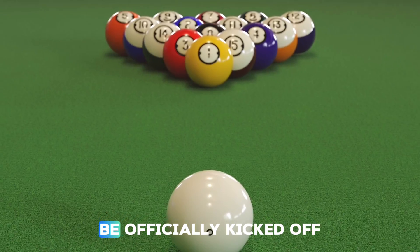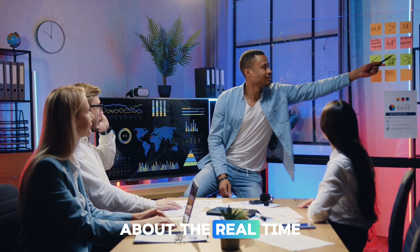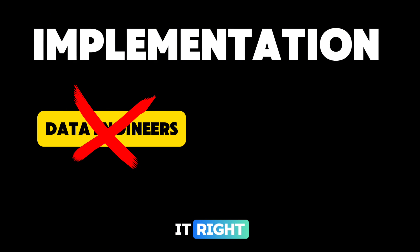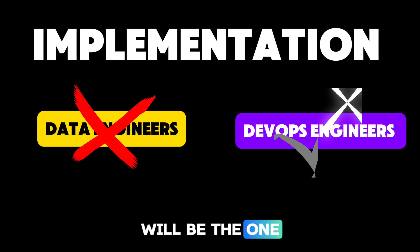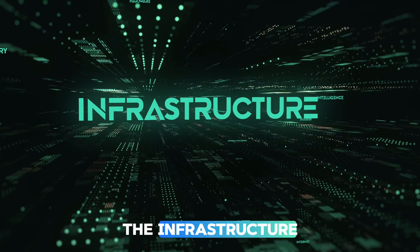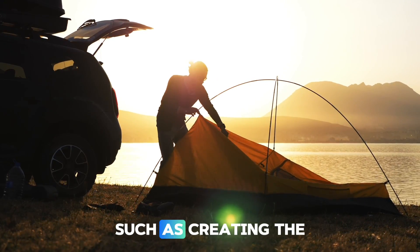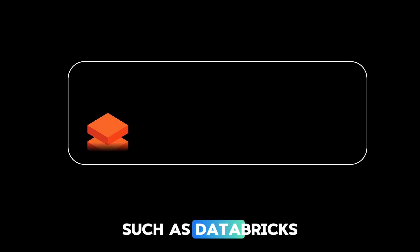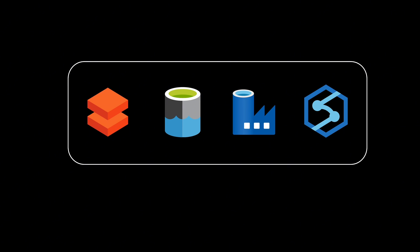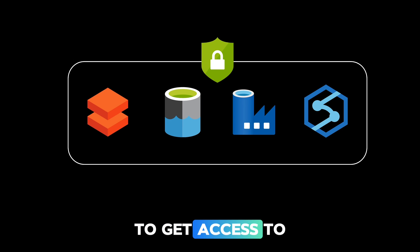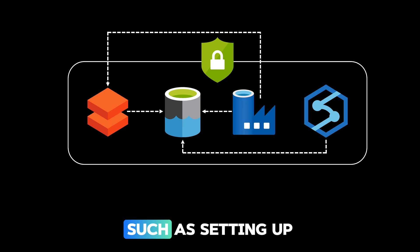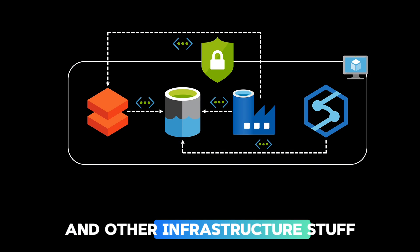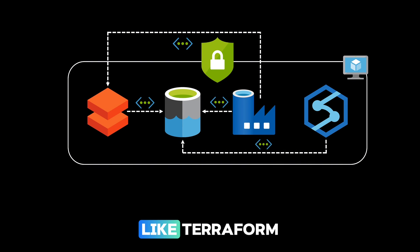In the actual implementation phase, the project is officially kicked off — but interestingly, data engineers will not be the ones initially working on it. Instead, the infrastructure team, such as DevOps engineers, will be the first to start. The first and foremost step for any data engineering project is to set up the infrastructure: creating the different resources and tools required such as Databricks, Data Lake, Data Factory, Synapse Analytics, etc., configuring security elements, and configuring networking of all resources such as setting up private endpoints, virtual machines, and other infrastructure. This infrastructure setup is often done using technologies like Terraform or Bicep templates.